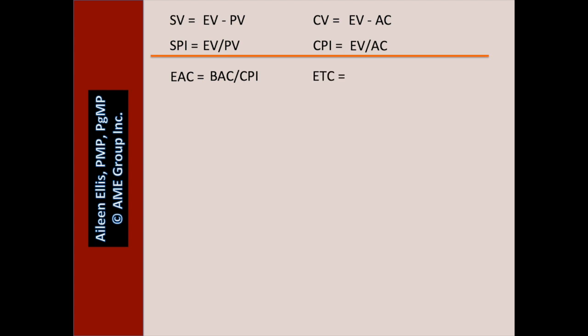Related is ETC. This is an estimate of how much more we believe we need to spend to finish the project. The equation: ETC equals EAC minus AC.